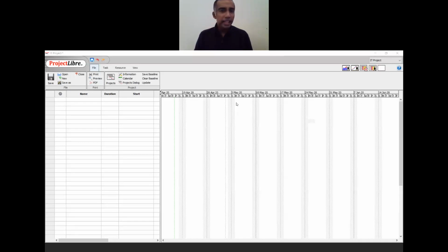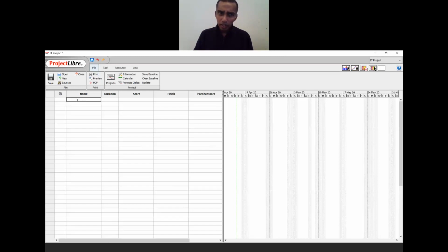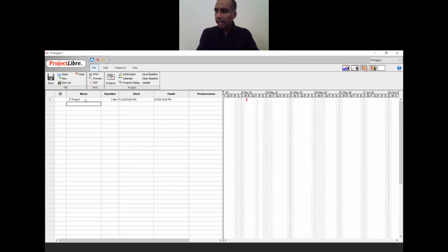Step number 4 is basically entering all your work breakdown structure information. So here is what you do. You enter all the data that I've provided to you just now in the earlier screen, right? So just look at step number 4 in your slide, and you can see all the details. So let me enter all of that information here. So you have IT project, which is level 1. And then level 2, you have a requirement phase. And then you have analysis phase. And then you have a coding phase, you have a testing phase, and then you have an implementation phase.